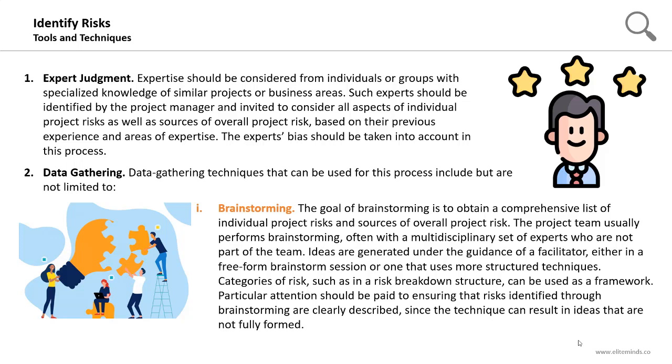The project team usually performs brainstorming, often with a multidisciplinary set of experts who are not part of the team. So it's preferred to include multiple perspectives. It's a key critical success factor for the identify risks process. So invite the right participants to the brainstorming session.